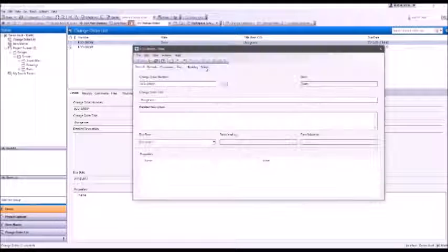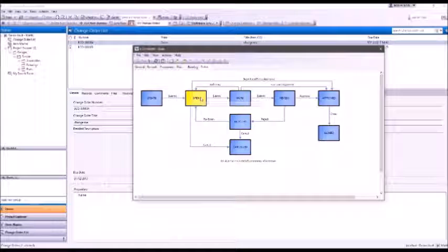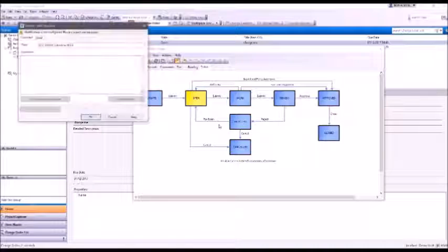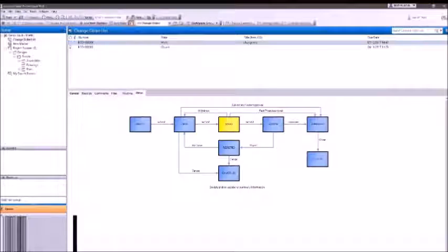We'll just edit that. Go up to the status. Open. Now my boss reviews this and says yes, it's worth a change or no, in which case we'll cancel it. Even if we cancel it, the record of the request is in the system. So if it gets requested week after week after week, there's something wrong, even if we can't put our finger on it. We should get around to changing it. If it gets requested and actually, yeah, it's a good one, we'll submit that. That gets submitted, and at that point, it's in work.